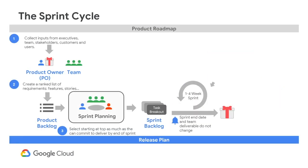Step three is where most of the recurring action process happens. The API team will select the most important user stories to work on for the coming sprint. The user stories have to be fully flushed out with business, technical, and testing details. The API team will review each user story, break down the activities and tasks needed to build it, estimate the effort, and commit to a set of user stories for the next sprint. Each sprint can be one to four weeks in length, but teams often settle on two weeks as the happy medium.